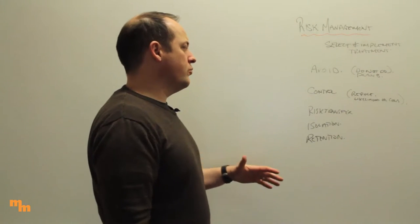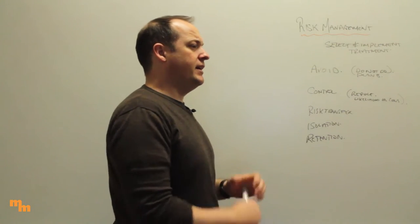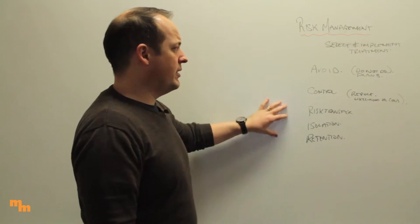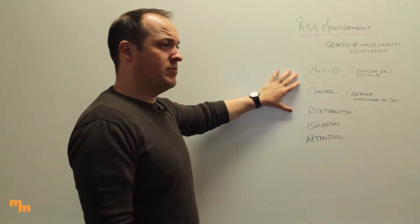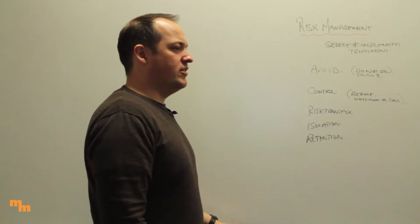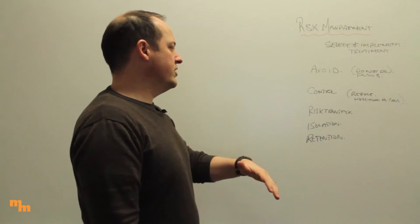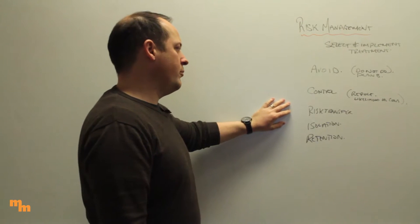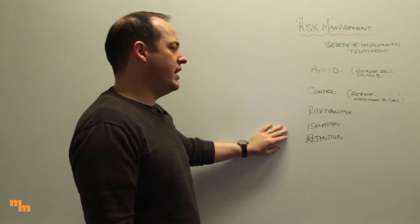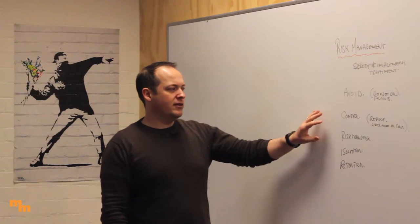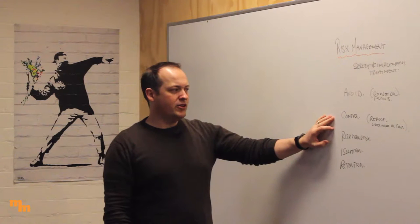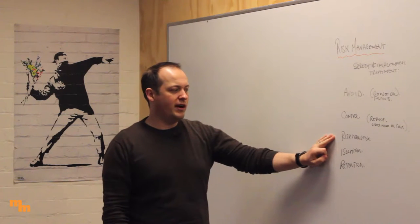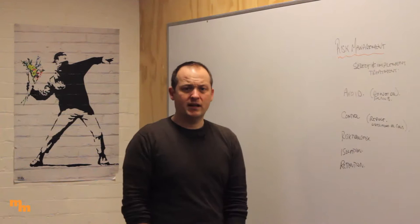Finally, there's retention — whatever's left over after all that, we just accept. We accept the burden of loss or benefit that comes to us; we're just going to live with it. It might be what's left after all other strategies, or we might have to accept the whole thing. Residual risk is what we retain when we can say: we can't avoid it, we've controlled it as much as we can, transferred as much as we can, isolated as much as we can — whatever's left is ours.